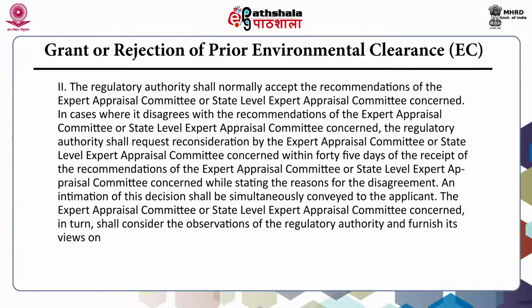An intimation of this decision shall be simultaneously conveyed to the applicant. The Expert Appraisal Committee or State Level Expert Appraisal Committee concerned in turn shall consider the observations of the regulatory authority and furnish its views on the same within a further period of 60 days.